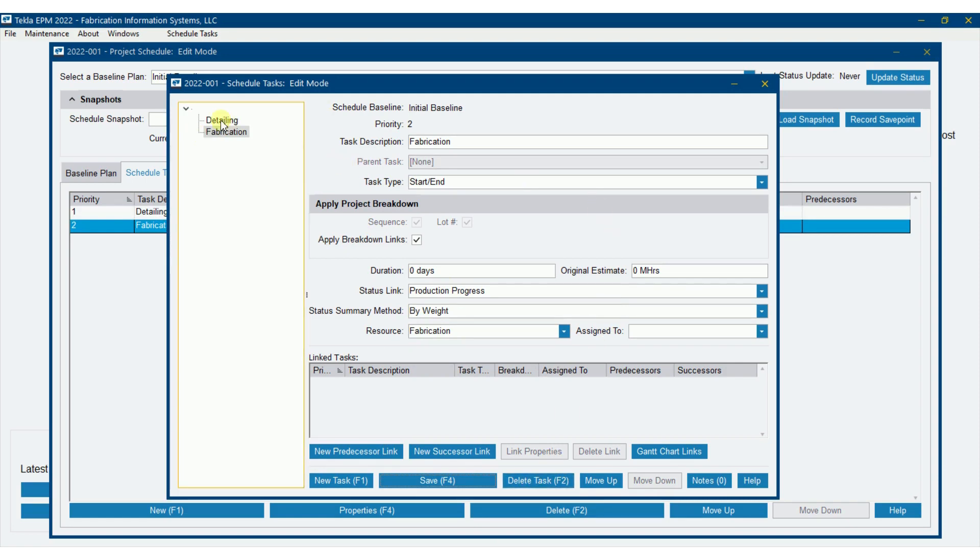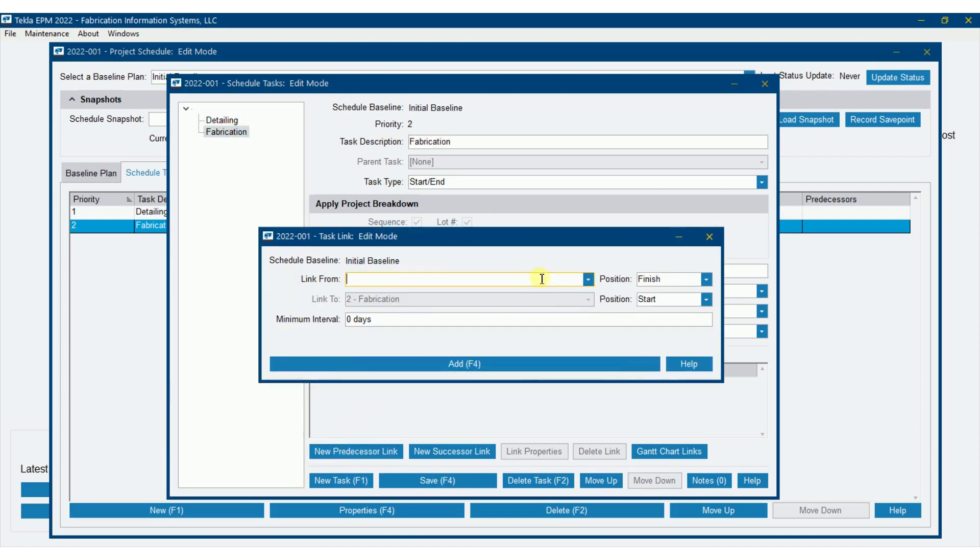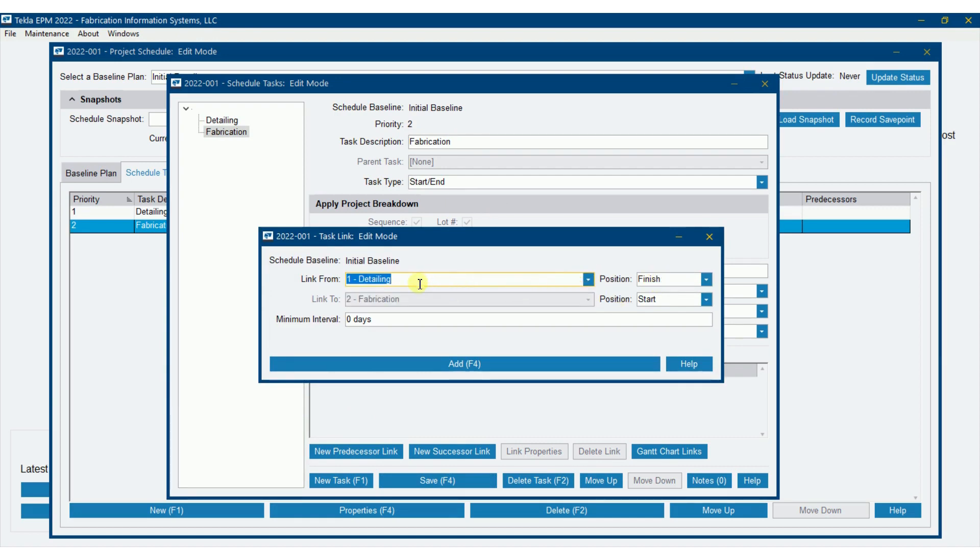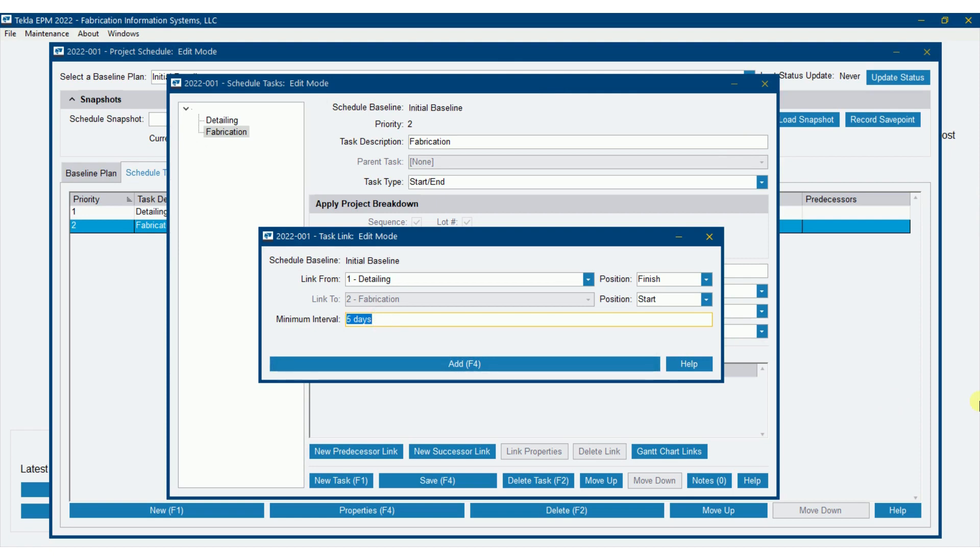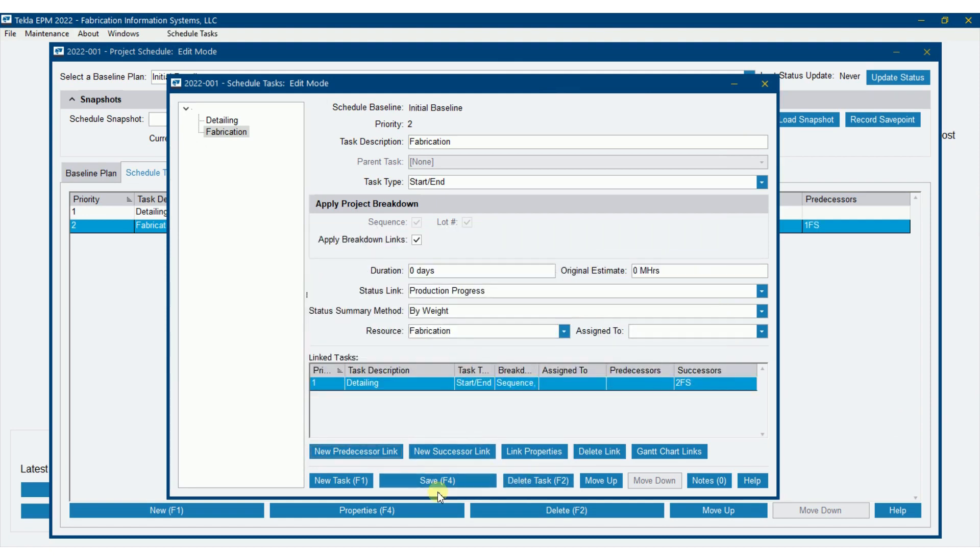Alright, now here I also have the opportunity to link this back to detailing. So in other words, I'm going to do right here, I'm still on fabrication. I could click on detailing and go back to it here, but we'll go to new predecessor link and say that I'm going to link from detailing. And detailing has to finish before fabrication can start. Now I could also overlap them and say minus five days. I could say, put a five day gap in between maybe for scrubbing, if you didn't have that in your detailing dates, whatever you want to do. I'm going to leave it at zero days. Just whenever detailing finishes, fabrication will start. So I'm going to save that.